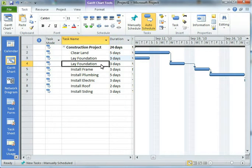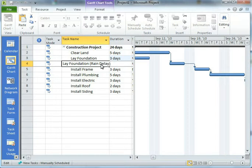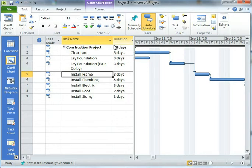I'm going to take my second lay a foundation and I'm going to just rename it a little bit here to say that it's got rain delay factored in. So now it's lay a foundation with a rain delay added in.